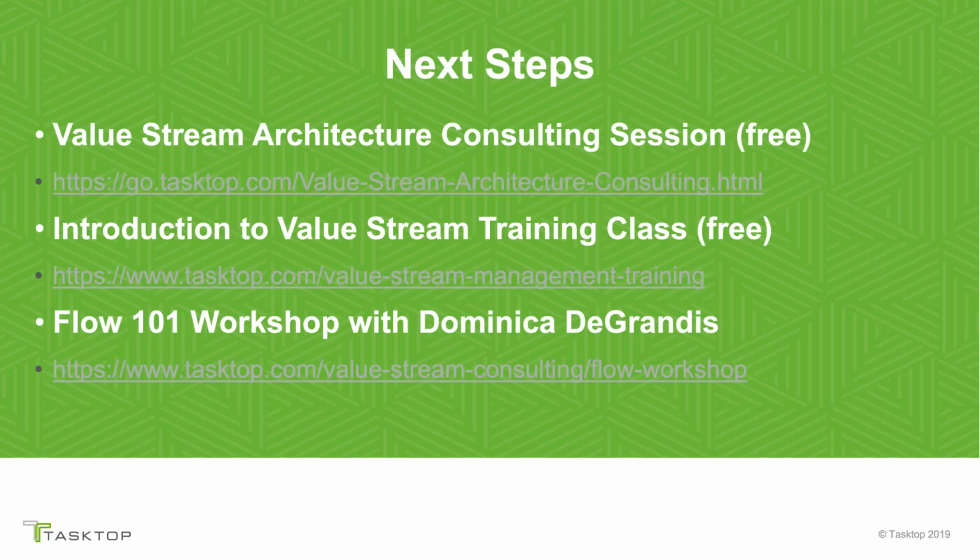So the metrics are tied to the business outcomes. The metrics help show you where things might be slowing down. If you look at the flow items, and at the other metrics called flow load, flow efficiency and flow time, they tell you how many features are coming out the door and how often.